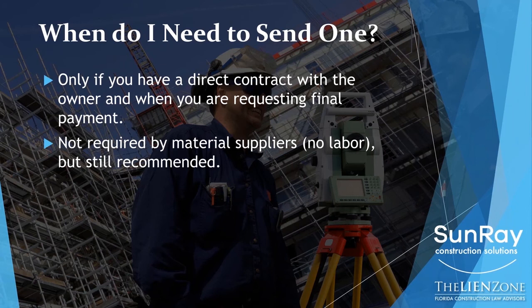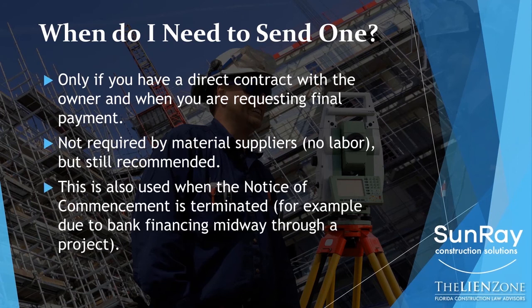That's why we recommend that when you lien a job, if you are supposed to send a contractor's final affidavit, that you do that at the same time you record and send out your claim of lien. The only other time that you really need to send a contractor's final affidavit is if the notice of commencement on the project is terminated, and that typically happens during the course of a project when maybe bank financing comes midway through the job. That's the other time we typically see this happening.